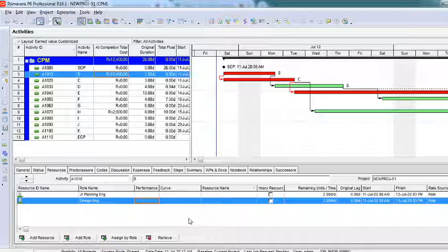I can calculate that into quantities also. I can calculate that into human hours also. How many human hours do I need extra? So that's how we decide that overtime has to be done, or 2 hours extra have to be done, or we have to add more human resources, all those things. So that's what this all comes into the picture.